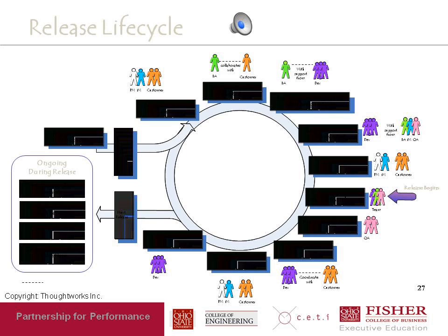These stories are basically then taken and grouped into releases. So when a release begins, out of these high-level stories, the candidates for a particular release are identified. These stories are then refined and analyzed some more, and then broken down into a consistent granularity. So now we've gone through the exploration phase of the release. The next phase after that is the commitment phase, where the team says, okay, this is what we are going to do in the release.